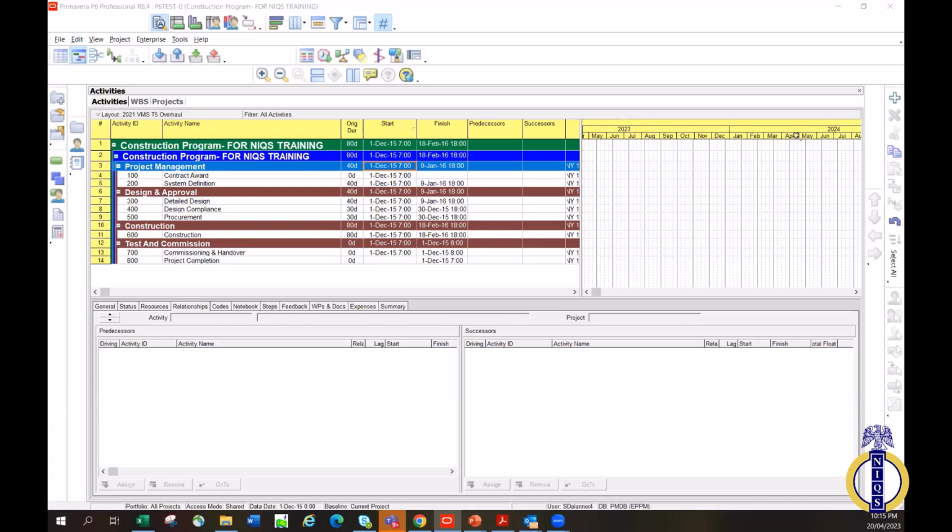If you are a QS and you want to prepare a schedule based on that, the first thing you say is strip excavation. You say, okay, remove topsoil 150 mm. Of course, you do site clearance first. When you're done with clearing of your site, what's next? You remove topsoil. Then you put in your profiles. You must have marked the building and pegged the building. Then you start excavating all the trenches.